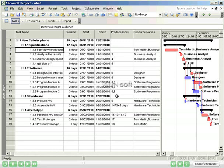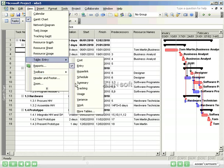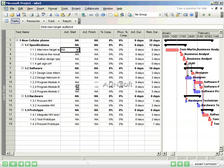Microsoft Project provides a method to properly record activity. To do this, from the Main Menu, View, Table, Tracking.